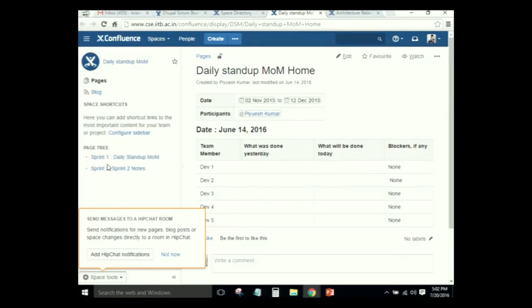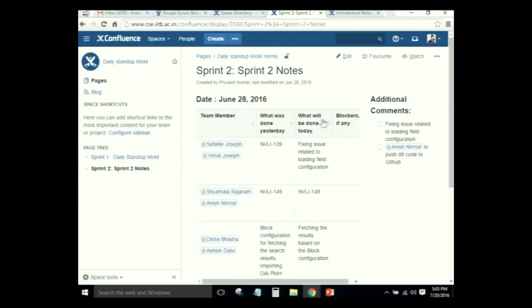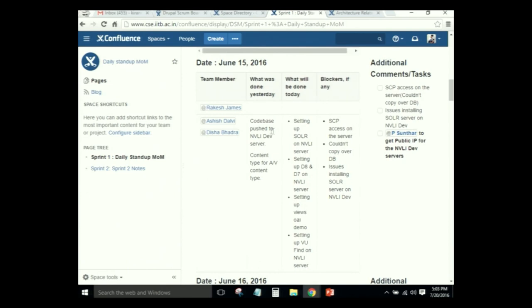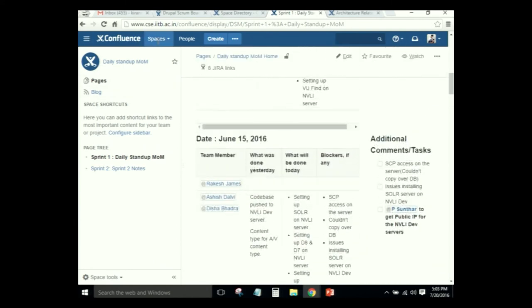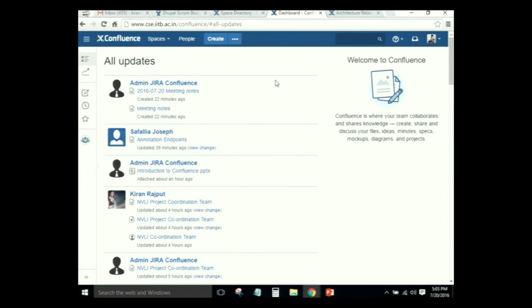In the sprint, teams have daily standup meetings that are 15 minutes long. Meeting notes are made on a regular basis and uploaded here — summarizing what was done yesterday, what will be done today, and any blockers. Confluence has a lot of options and features, some self-exploratory and some communicated today. We request all of you to start exploring, start using it, and let us know your feedback and requirements for customization.